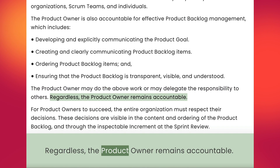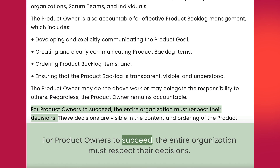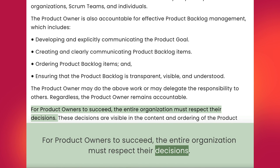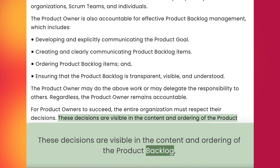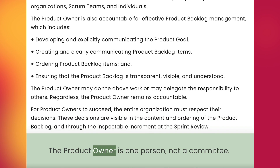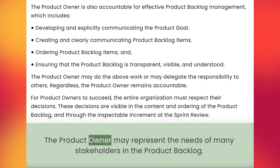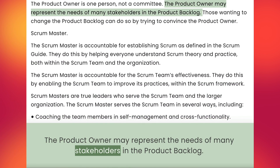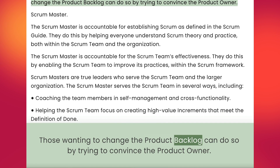Regardless, the product owner remains accountable. For product owners to succeed, the entire organization must respect their decisions. These decisions are visible in the content and ordering of the product backlog and through the inspectable increment at the sprint review. The product owner is one person, not a committee. The product owner may represent the needs of many stakeholders in the product backlog. Those wanting to change the product backlog can do so by trying to convince the product owner.